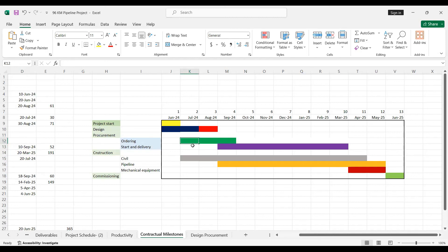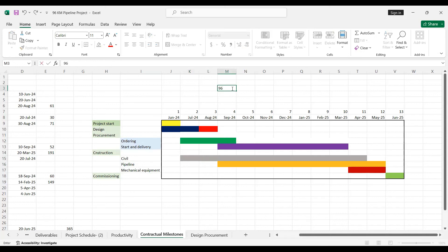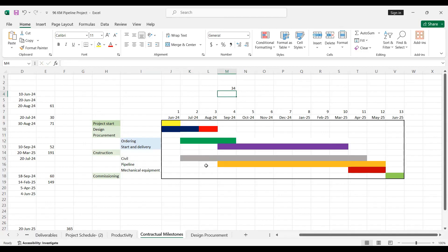Make a mind map and visualize this construction strategy on paper before going into Primavera P6. Then construction: civil works are ongoing, and the pipeline starts when the trench is ready. These two months cover trench preparation. For the 96-kilometer pipeline, working section by section — for example, 34 kilometers in two months — involves site setup, office setup, car settings, team meetings, and a lot of groundwork.